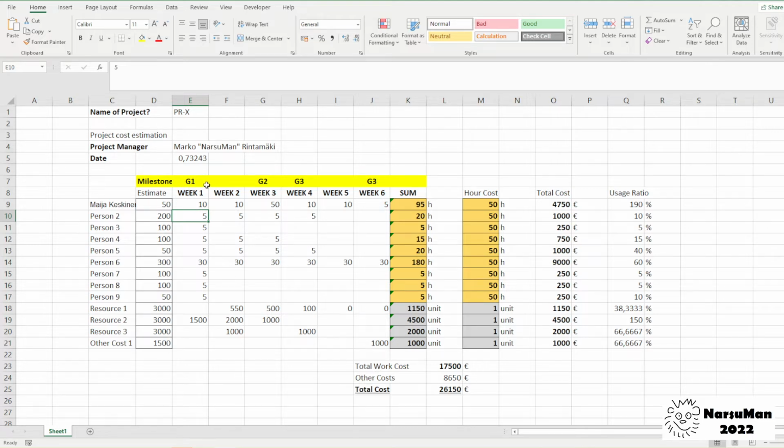Then we are looking at our schedule. So our project is a bit longer than just 6 weeks. And we were also talking about using sprints. If we are doing this week planning, we are using the week names or numbers. We can also use this as a sprint. Sprint 0, I put it here. And now I just copy these sprints there. So I have now sprint 1, 2, 3, 4, 5.